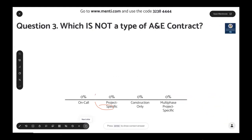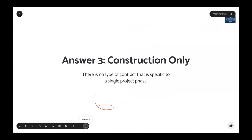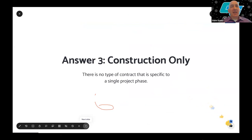Question three: which is not a type of A&E contract? Choices are on-call, project-specific, construction only, or multi-phase project specific. The correct answer is construction only — there is no type of contract that is specific to a single project phase.